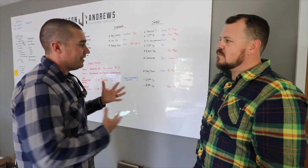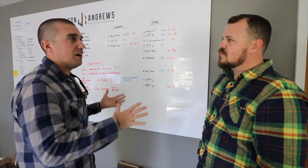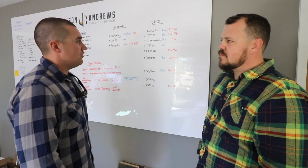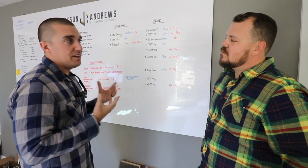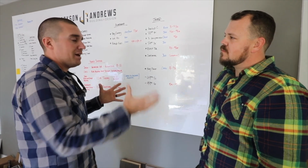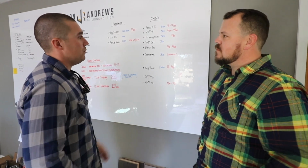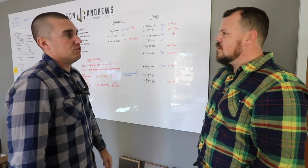It takes a lot of practice, and I think we're always trying not to have our whole team completely booked out solid. Sometimes we have to be fluid. So if something unforeseen does happen, or sometimes it's just the right opportunity to take care of something on a job that comes up, rather than finishing a job and coming back and doing it later, we've got to have someone that we can slide back in to oversee that if we really have to start something else on a date.